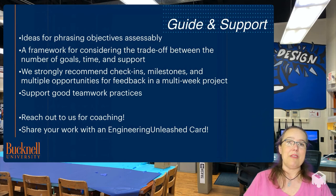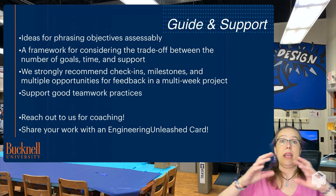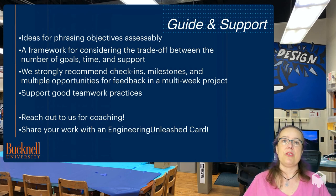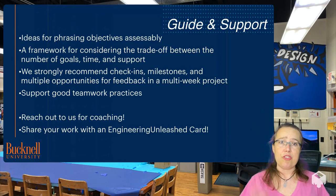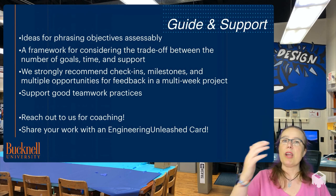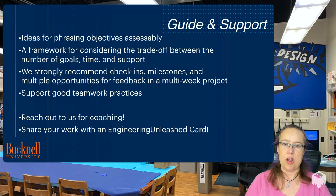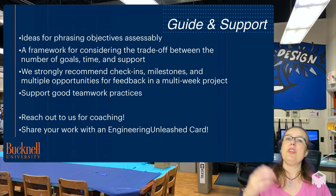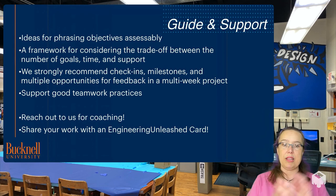We really recommend having check-ins and milestones and lots of opportunities for feedback if you have a long project. Just stating at the start of the semester, 'Hey, by the end of the semester you all should have built a car,' is not as much a recipe for success as having every other week the students turning in part of that car. If you have students working on a team, there are lots of resources in the world for making and supporting good student teamwork. We don't want just one person running away doing all of the CAD and 3D printing while other people are left to just write the report.